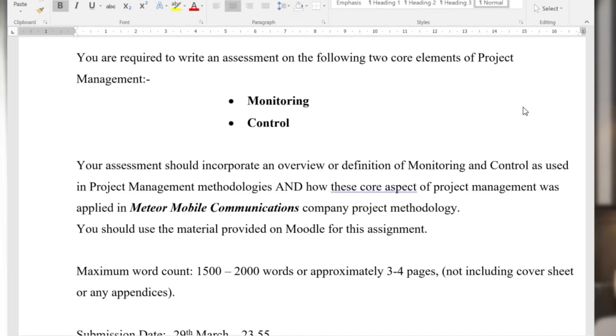If you have, for example, the feasibility phase, you have toll gate 0 and then toll gate 1. Toll gate 0 is where we've decided to kick off the project. The input to that was the technology products and services roadmap. So we have a possible contender, a possible project that we want to run.